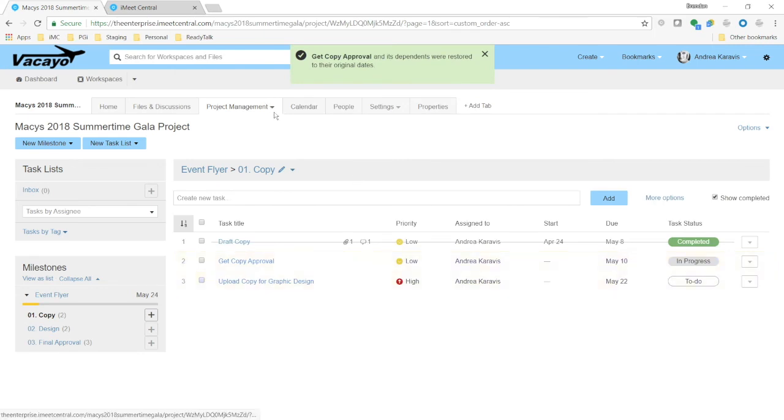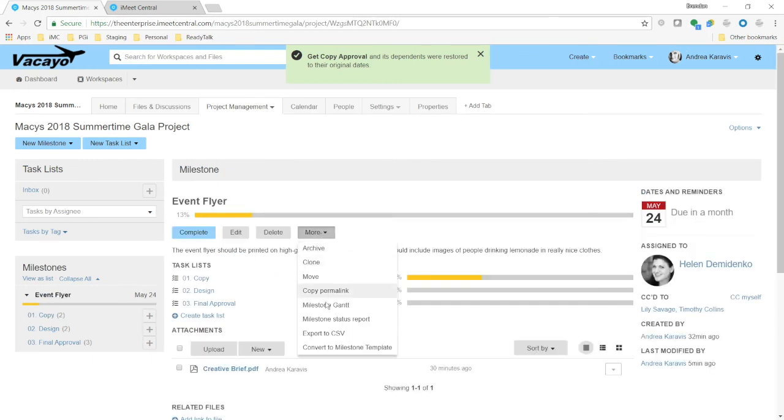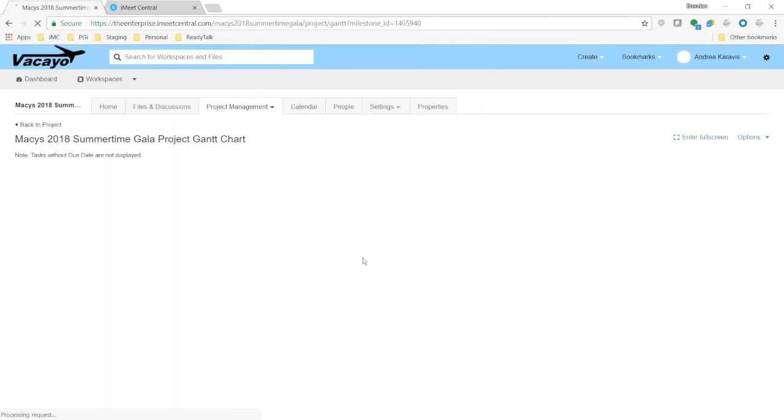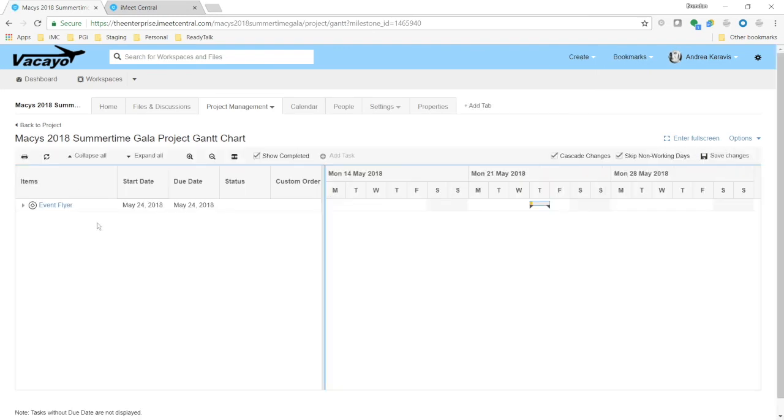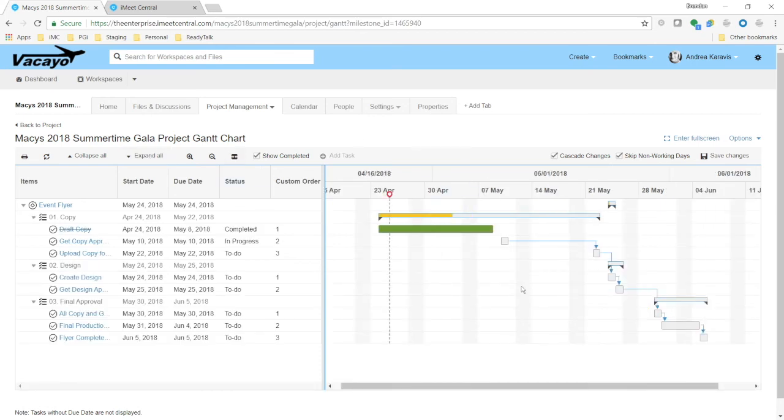So my warning to you all is, if I go back into the Gantt chart, yes, you can create task dependencies across your entire project plan, and people freak out, and it's amazing, and they're like, this is the best thing I've ever seen. But then they're halfway through a really long, important and exhaustive project plan, and somebody goes in and futzes with the dates, and it completely derails your timeline and your deadlines. And there's no way to get it back.